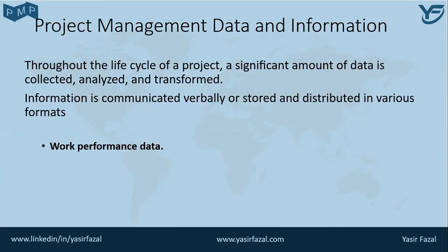Examples include reported percent of work physically completed, quality and technical performance measurements, start and finish dates of a set of scheduled activities, number of change requests, number of defects, actual costs, actual duration, etc. Project data is usually recorded in some kind of information system and in project documents.